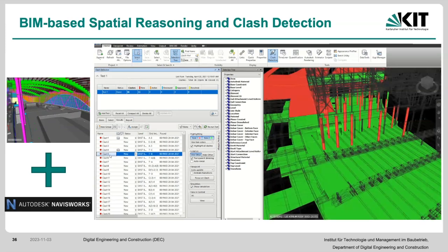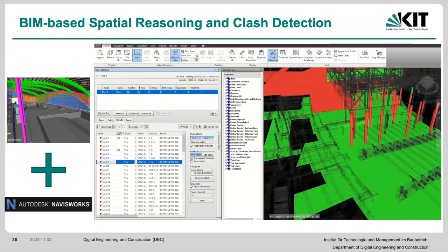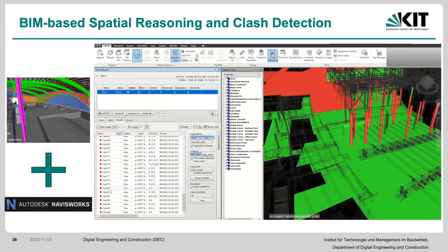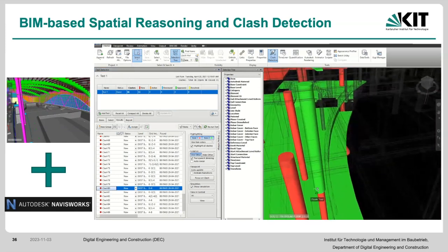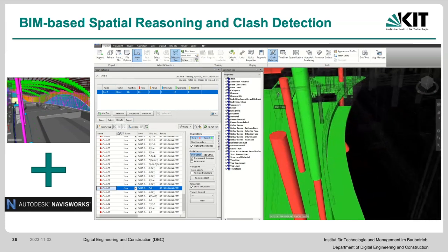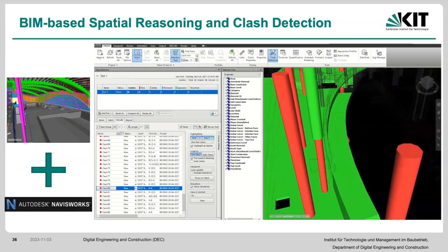This is if you have very, very large projects, a project that has many engineering disciplines, and you're still doing sole BIM on various different aspects, you still need to know what elements are not going to have any type of clashes with the other one. Because if you have spatial clashes, what is going to happen? You're not going to be able to build this, right? And you don't want to know this when you're on a construction site. We have had situations like this as well, where the mechanical engine, and these are aspects that we right now take for granted. Well, we put it both together and then we take it from there.